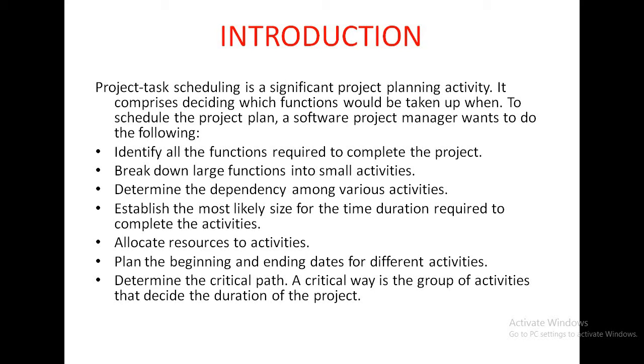In this way, the project manager schedules the different functions. First is identifying the different functions. Large functions are broken into different parts. Then determine the dependency. Then the time duration of the project. Allocate different types of resources. Then plan the beginning and ending date. Then determine the critical path.